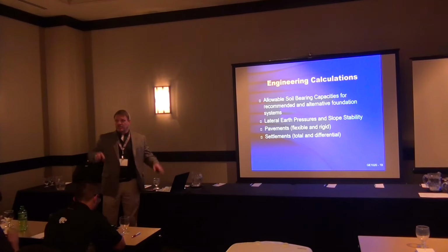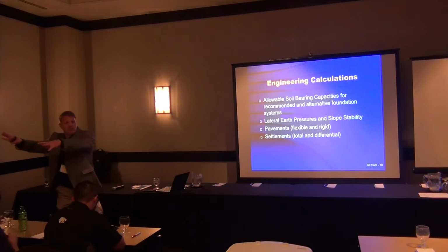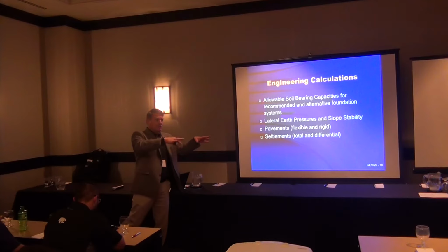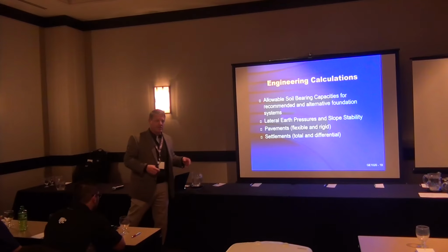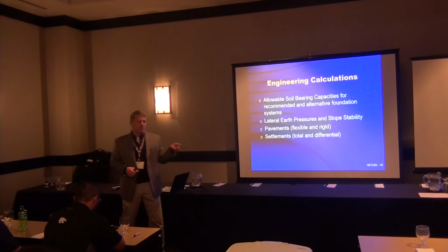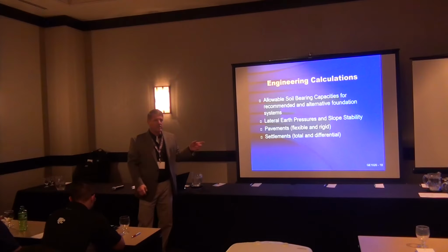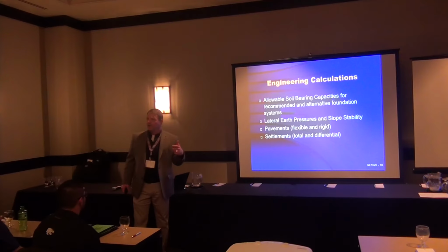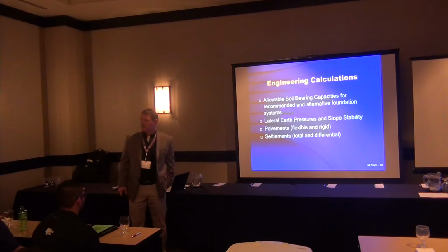So the civil engineer said, hey, Mr. GC, it's yours. The GC hands it off to their design-build sub, and says, here, this is your piece. And the wall designers typically put a note in there that says, this does not include global stability analysis. So when the wall fails due to global stability failure, whose is it? For the lawyers to figure out, and you're all going to lose. Everybody's going to lose because everybody's going to get drug into the fight.